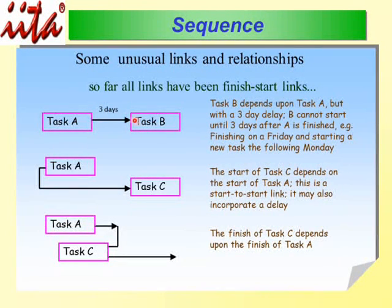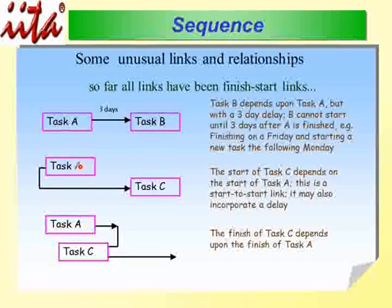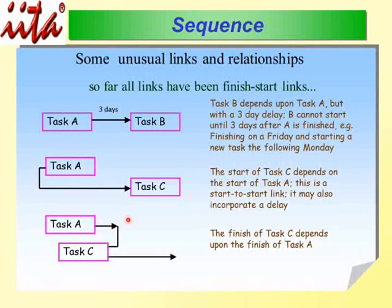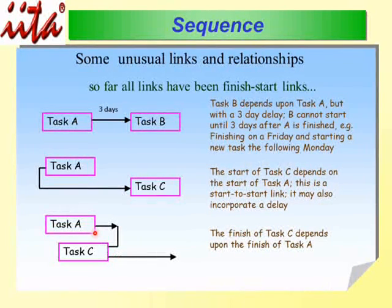There is also what is called Start-to-Start, where task C can only start when task A has started — there may also be a delay. There is also Finish-to-Finish, where task A will have to finish before task C can finish; task C just keeps going until it receives the signal that task A has finished. These are the other relationships we have, apart from Finish-to-Start.